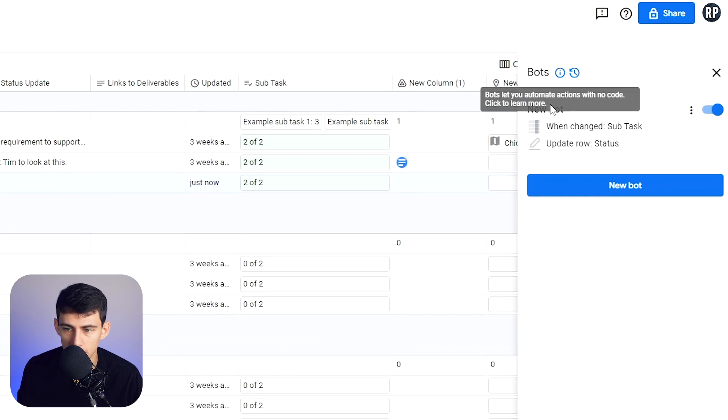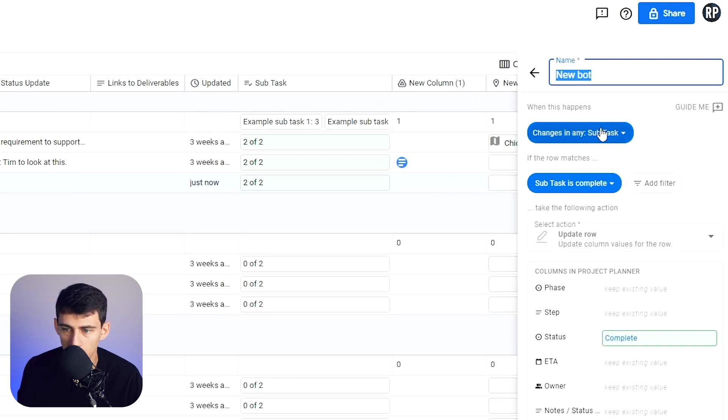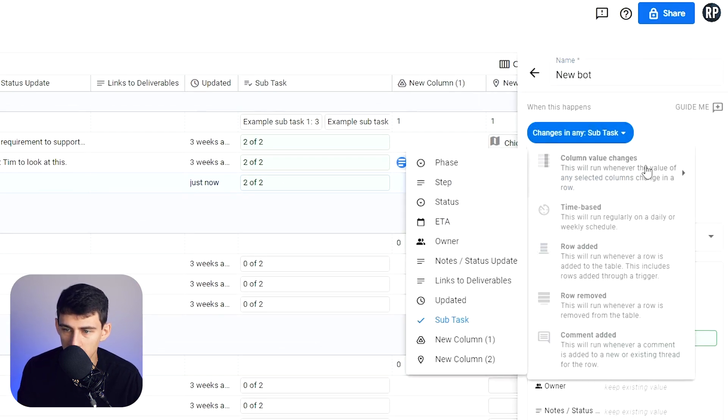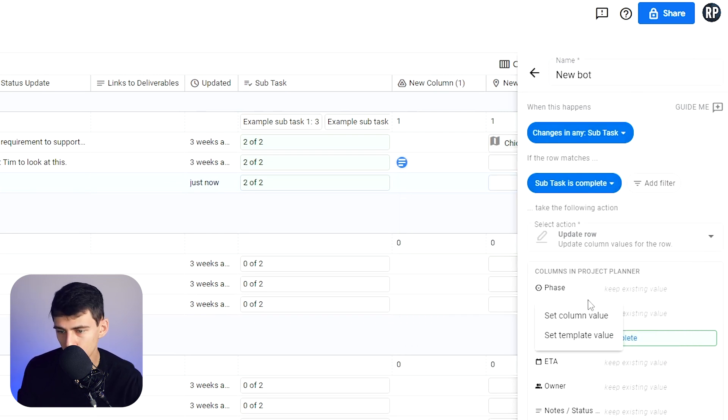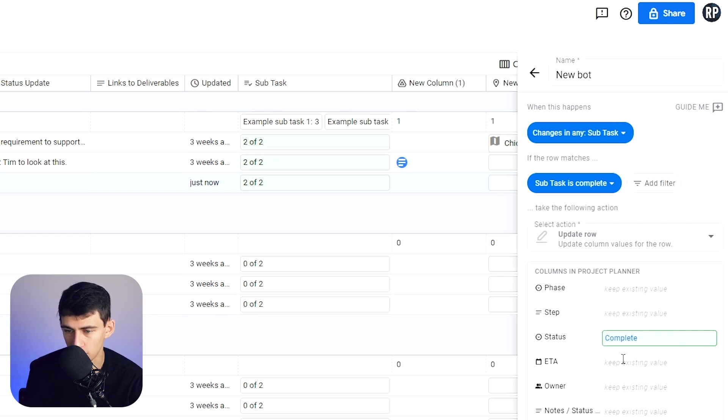But in here, this literally just went, okay, when changes in any subtasks and subtask is now complete update row of status to complete, and it can do a bunch of different ones to all the different ones.